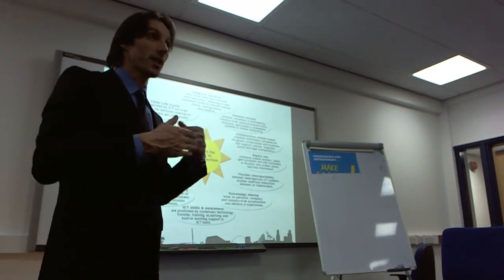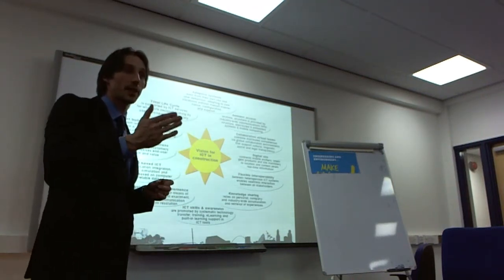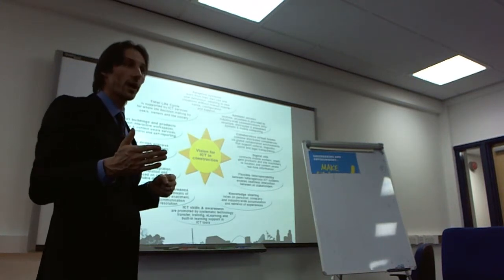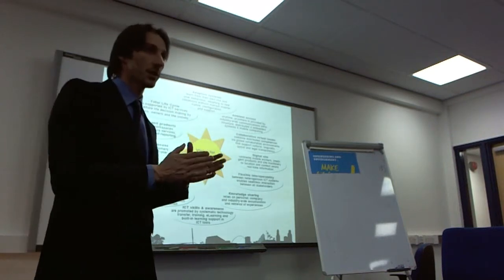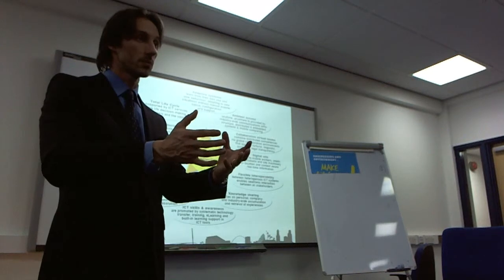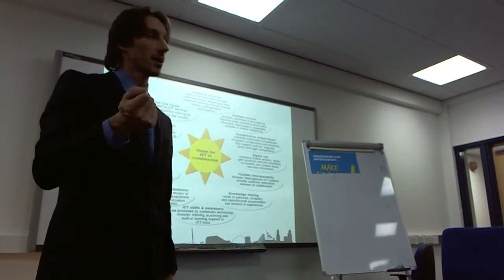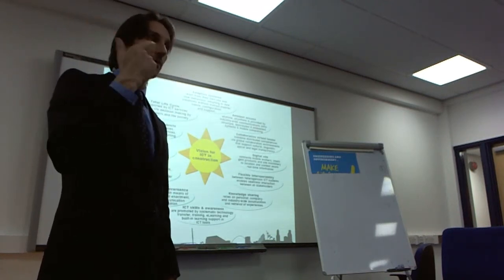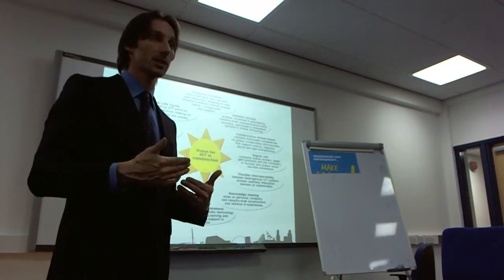That you're going to have a quality of life in that building that you don't want to be worrying about. So there are now tendencies to go further beyond design and build, and we are starting to see design, build and operate schemes where I, as a contractor, design a building, construct it for you, and then I give it to you to use, and what you give me is a monthly fee. And I will take care of keeping it heated for you. I'll make sure that it's technologically updated whenever it's needed, and so on.